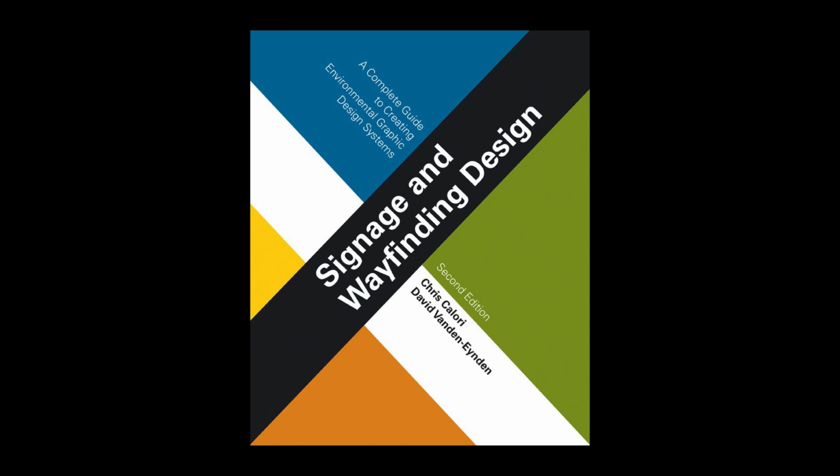As mentioned, signage fabrication is part of the construction industry, and the signage specs become part of the fabrication contract, which is typically let by construction industry professionals such as general contractors, GCs, or construction managers, CMs.